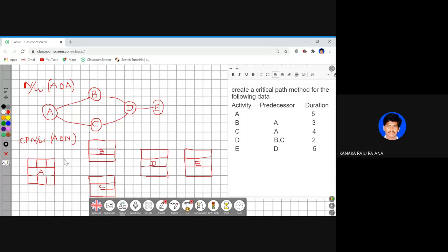After fulfilling your critical path network diagram, step number one, which is the most important step, is that you need to assign a start point to the entire project. Let us say this is the start point of your project, which is called S, and this is the end point of your project, which is called E, which can also be called start and finish, which I have shown you in a Gantt chart also. Start, finish, duration. Those are the parameters which are very, very important.